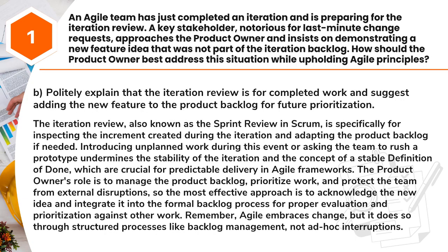Answer. B. Politely explain that the iteration review is for completed work and suggest adding the new feature to the product backlog for future prioritization. The iteration review, also known as the sprint review in Scrum, is specifically for inspecting the increment created during the iteration and adapting the product backlog if needed. Introducing unplanned work during this event or asking the team to rush a prototype undermines the stability of the iteration and the concept of a stable definition of done, which are crucial for predictable delivery in Agile frameworks.